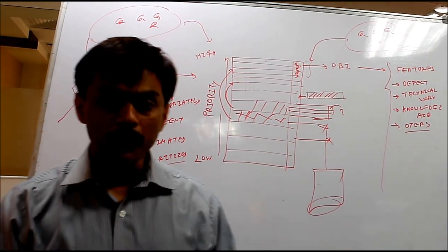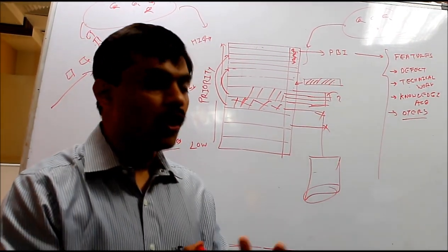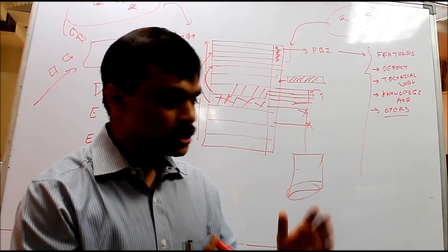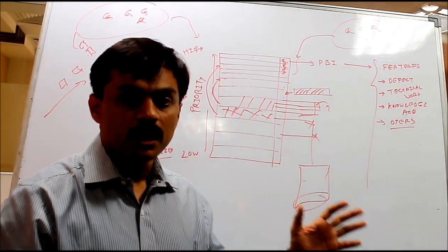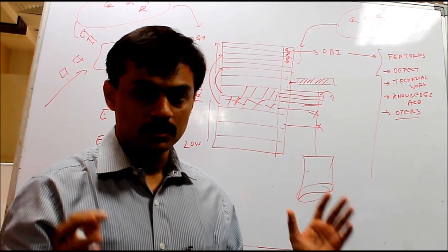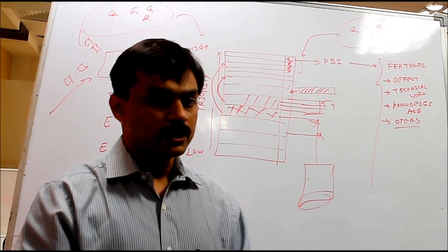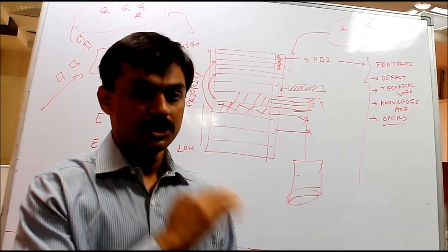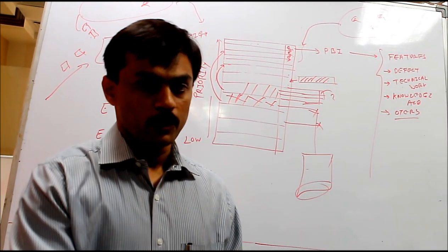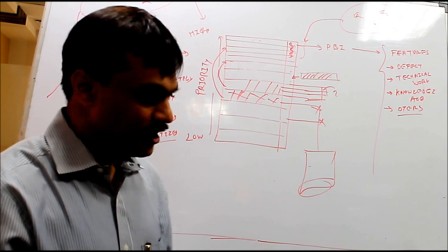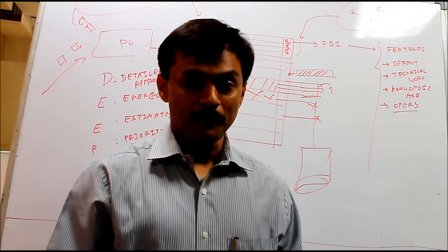So in summary, a product backlog is a list of all desired product functionality. It is controlled and managed by the product owner. This Scrum artifact is accessible to all of the project stakeholders, and a good product backlog is deep, detailed appropriately, emergent, estimated, and prioritized.